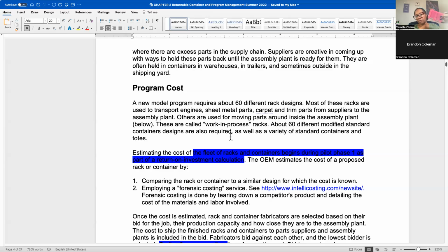I'm going to put 50 of them in the standard bin. And then I'm going to put another 50 in a certain type of tote. And then 150 of them are going to go on a rack, those sorts of things. So you want to really start fleshing out what you're going to use, and it may change, but you want to have an idea, because at this point you want to help the program understand what the cost is going to be.